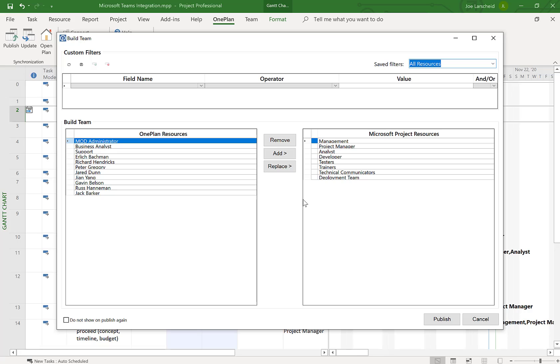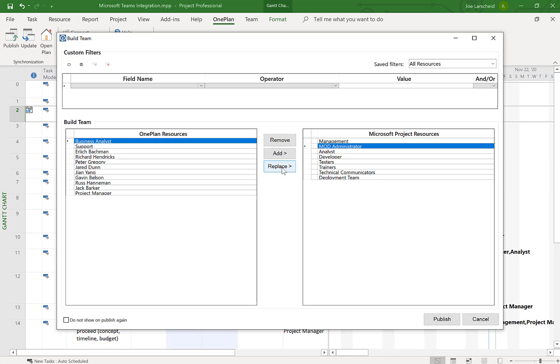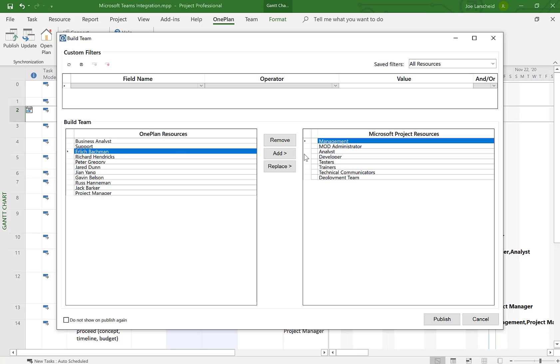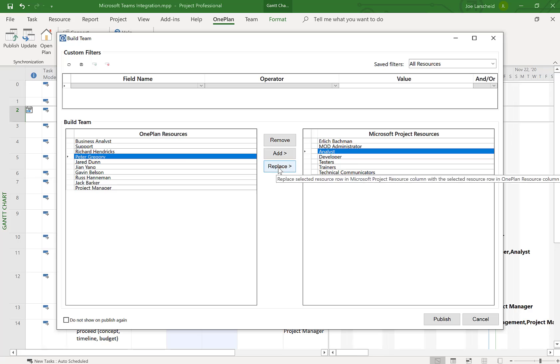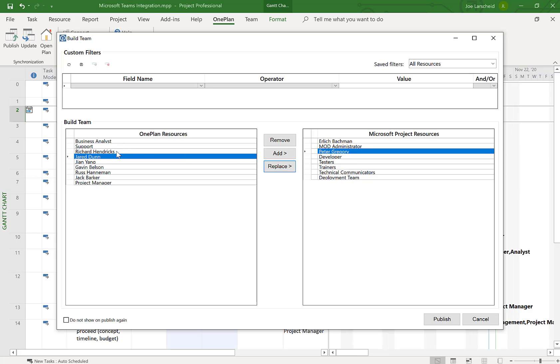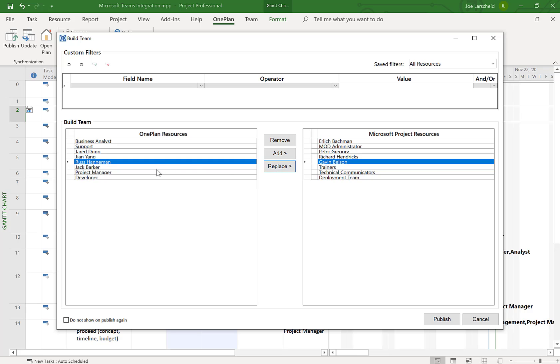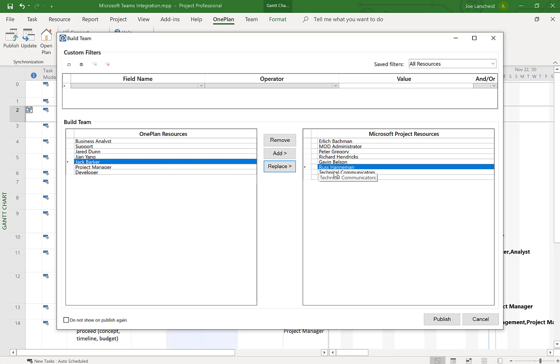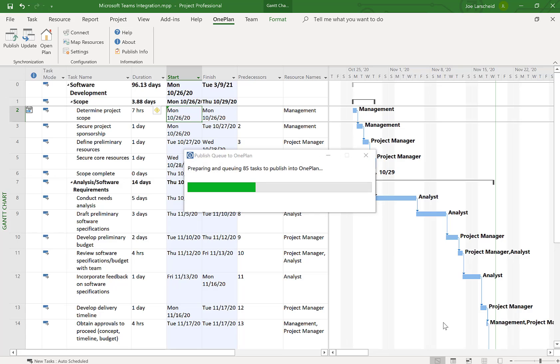The next step here in publishing is mapping resources. So you have your resources in your Power App solution, your resource center. And so what you want to do is map them. I'm going to map myself, I'm the administrator, to project manager. I'm going to give Ehrlich here management position. Peter is going to become our analyst. Richard is our developer. Gavin is our tester. Russ is going to be a trainer. Jack's going to be the technical communicator. So you get the idea of mapping these resources. And once I'm done mapping those resources, I can click Publish.